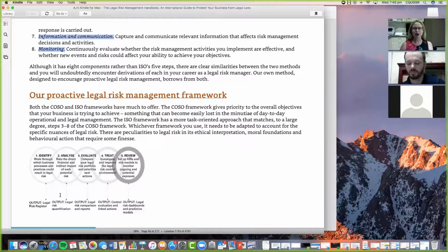Then what they say is you add up the overall typical impact, and then you do an alternative scenario here. You say, okay, if this same loss was to crystallise, but it crystallised in a way that made the consequences much more extreme, what would your hard dollar losses be over here? What would the impact on your reputation be over here?